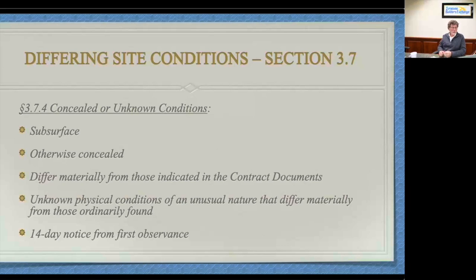People, when they hear of differing site conditions, typically think about something that might be subsurface, rock, an oil tank, water, something subsurface that is going to impact the constructability and or function of the foundation system, things of this nature. It's going to make it hard to do the work. Obviously, differing site conditions are not just below ground. They're below ground, they're above ground. You could have a differing site condition in an existing facility that you're remodeling.